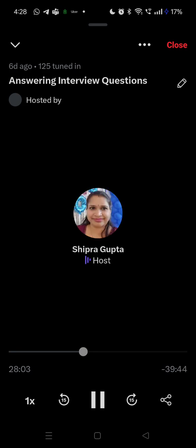So again, if you are not doing it at all in future, then there is no need to create a backlog item. If there is something where you are saying, we will do it for you, but not right now, we'll come back to it in future, then it's a backlog item and the BA can add to it. Same goes for dev.